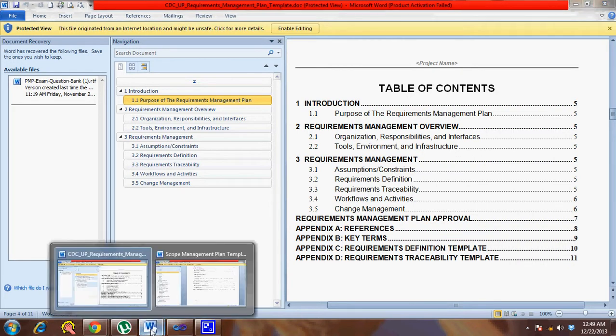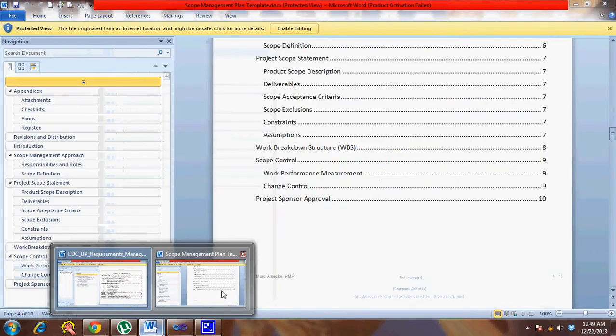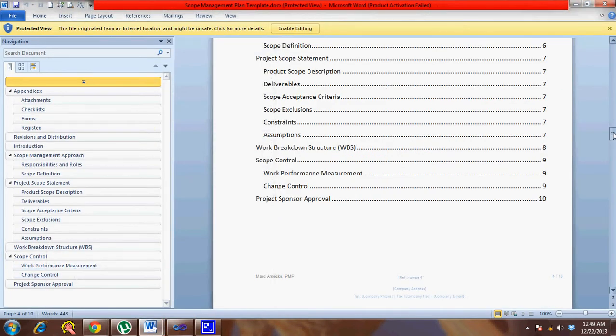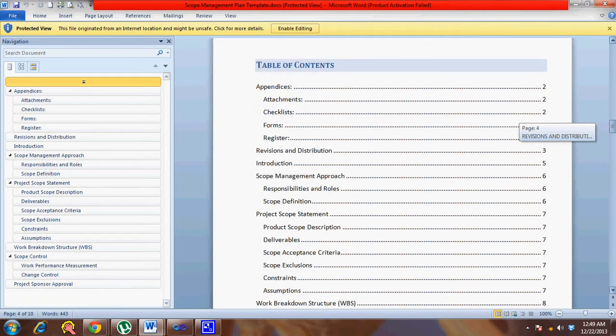If you get to the scope management plan, the scope management plan understandably will have details about different processes within the scope. So it would have details about how will you define the scope statement, how will you define the WBS. So collect requirements process will go into the requirement management plan. Anything apart from that, which is used to define the scope and create a WBS, will all be part of how will you do all these things, what tools and techniques will you use, when will you do these, will be part of your scope management plan.